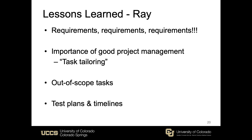Out-of-scope tasks were a huge time sink — tasks for which the team does not have training or experience in. A large part of this project was designing and creating a machine with parts moving on two axes that had to be strong and sturdy enough to hold large quantities of fluid. While we found similar devices online for inspiration, just the creation and troubleshooting of the mechanical parts ate up more than half the semester. In hindsight, we probably would have been better off contracting someone to design and build the device so we could spend our time on the electronics and coding. Hopefully our project demonstrates the value of combining senior seminar design with the mechanical engineering department in the future.